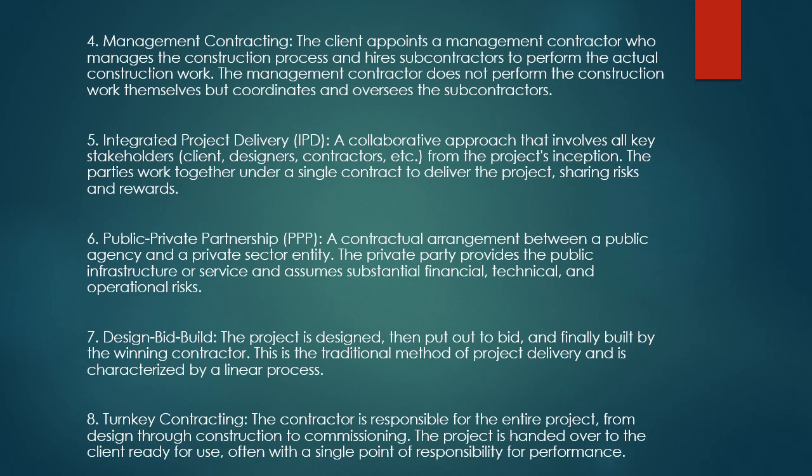Number 7, design with build. The project is designed, then put out to bid, and finally built by the winning contractor. This is the traditional method of project delivery and is characterized by a linear process.